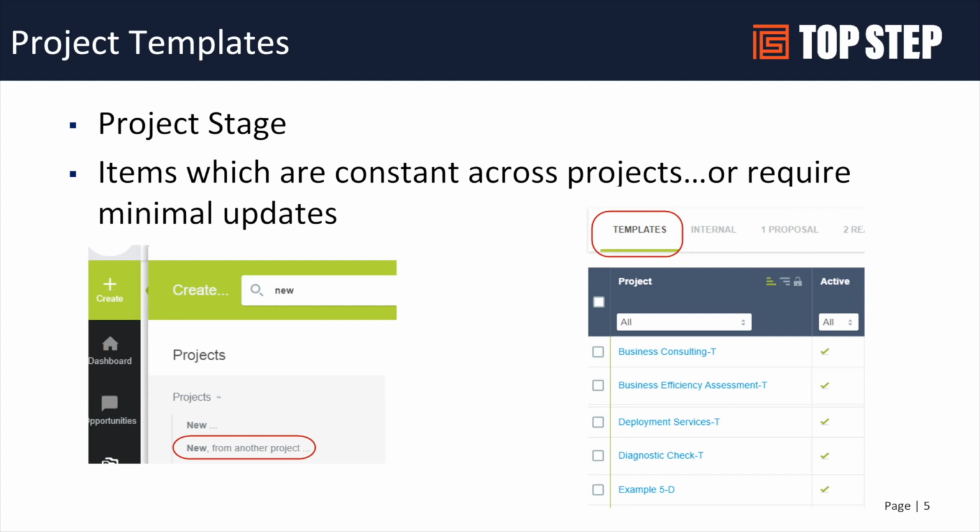You can copy bookings, you can copy assignments from the task structure. So if you have a template with tasks, you may have budgeted hours on each task and generic resources based on how you staff those projects. That can all come into your project, and then from there, you can always go in and change or update based on what was actually called out in your contract with your customer.